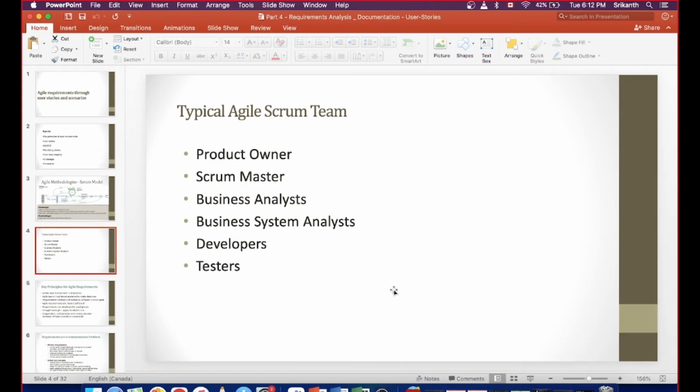But the scrum team, the actual development team implementing the project, will be different. No people can work in two different scrum teams at the same time, and that is against the agile scrum principles. So a product owner can handle multiple projects, but apart from the product owner, all the people will be allocated to a single team.